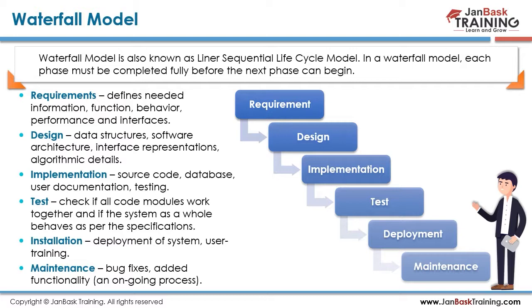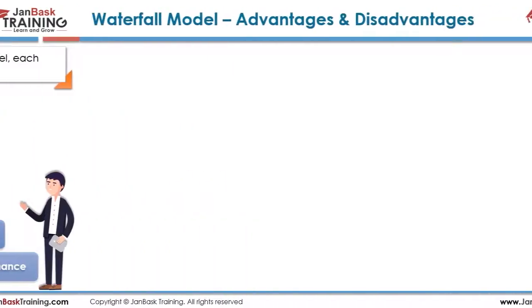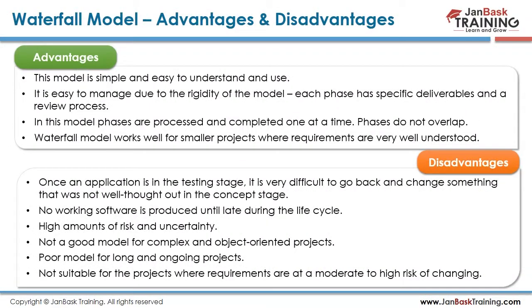Okay, so now you must have seen we have taken a considerable number of steps, starting from requirements, then designing, implementation, test, then deployment, and then maintenance. So you've seen requirement itself. Now, I'm just telling you out-of-the-box information as advantages and disadvantages: requirement itself takes around 2.5 to 3 months. Usually for a routine project of 1 year or close to 9-10 months, it takes around 1.5 to 2 months. For design, we take another 15-20 days, then implementation 30 days, then test again takes about 30 days. So coming to this phase, we have already consumed around 4 months of time.